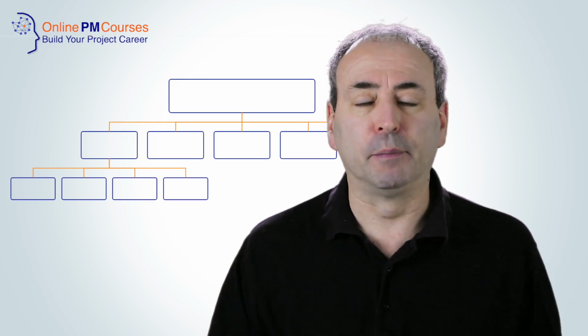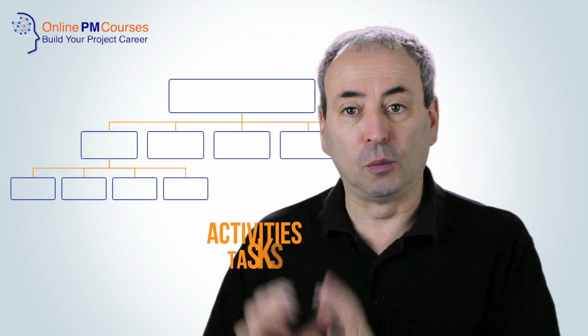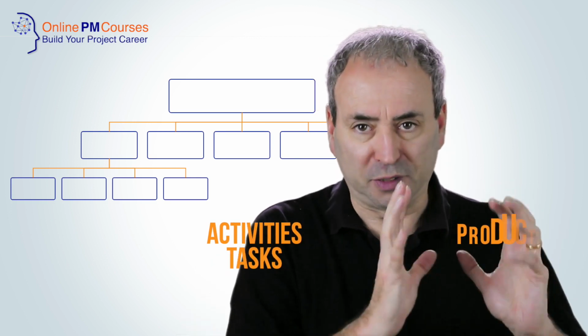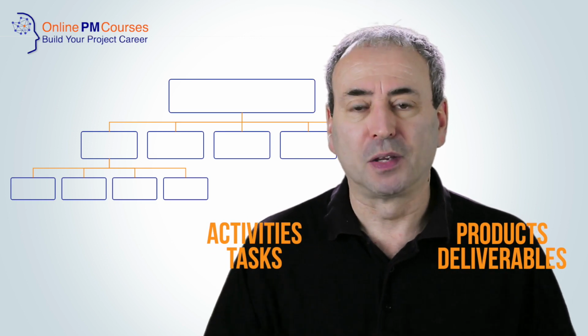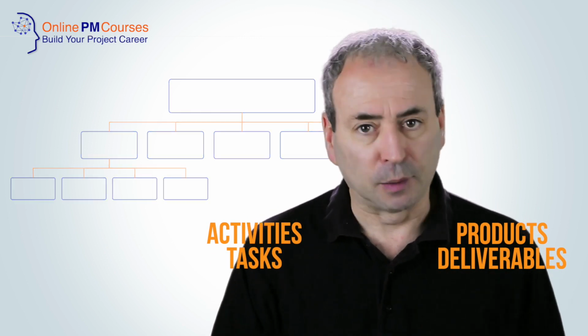However, my top tip is either stick to activities and tasks on the one hand, or to products or deliverables on the other. Do not mix the two within one breakdown structure.